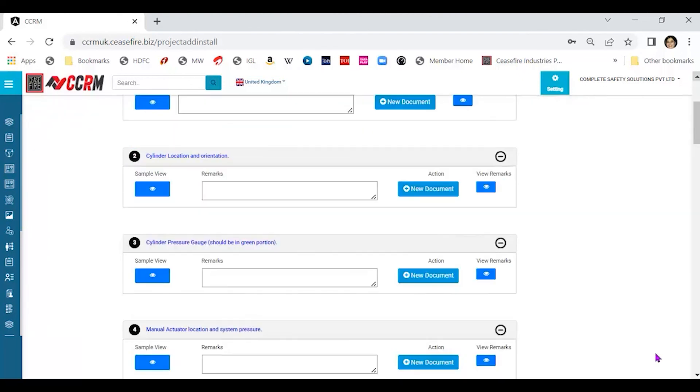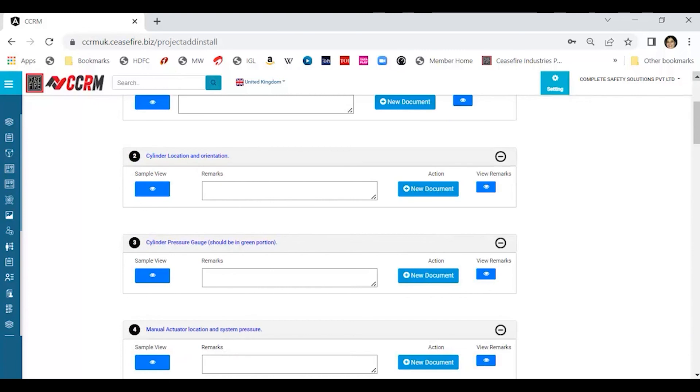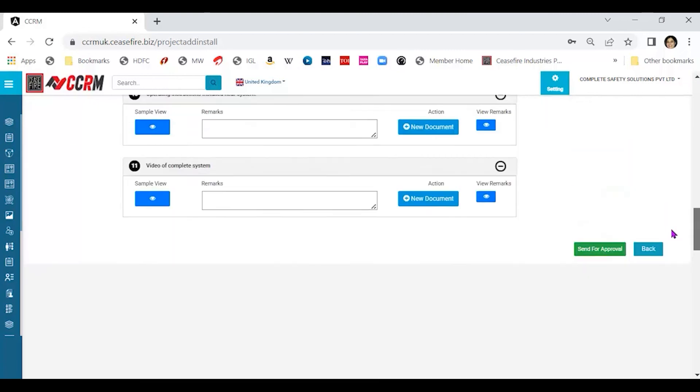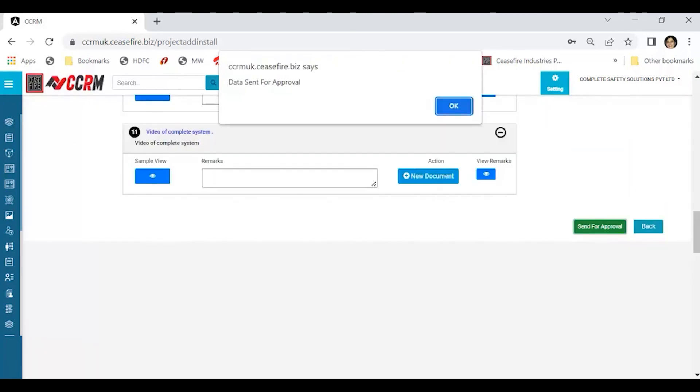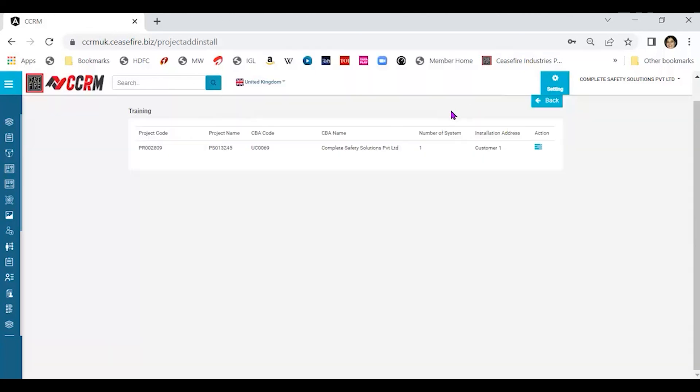So you see the data has been sent for approval. This means that this particular audit review data has been sent to the person who is going to review the entire system through the three tabs that we had seen. He will go through all the statements, see if there is any deviation and why. And also look at all the photographs and the video that we had uploaded. Based on his observation, he will either approve or reject.